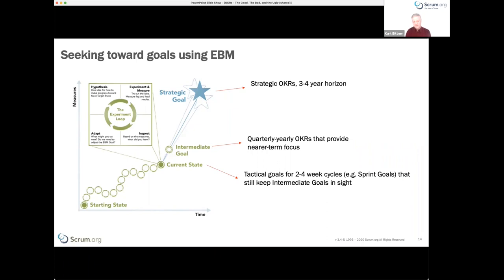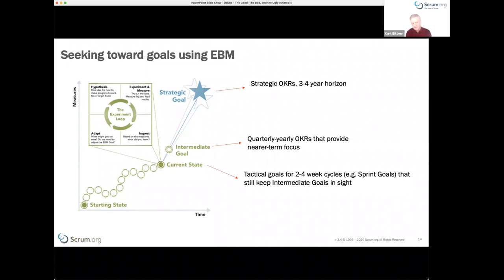Then we have a tactical goal, equivalent to a sprint goal — for a two-to-four-week cycle, something very specific that's tangible, time-bound, and has very specific measures, hopefully helping steer toward the intermediate goal, which steers toward the strategic goal. Within a sprint, we have an experiment loop: you have a bunch of hypotheses about increasing value — we call those product backlog items — you build them, and as you do, you measure them.